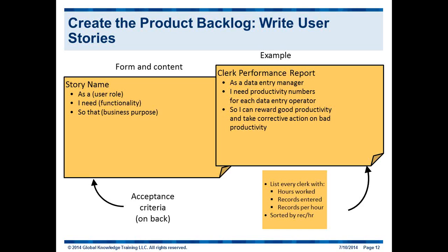So we capture a user story in a specific syntax: as a user, so who's using it, what do they need it for, what's the functionality they're requesting, and what exactly is the business purpose? Why do they need it? By following this format, it really helps us to think about who's the user and what's the purpose for doing this, and we can create a better solution. It invites us to do something called user-centric design.